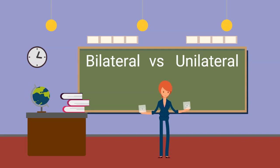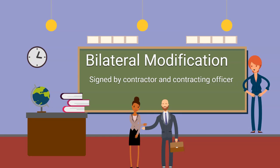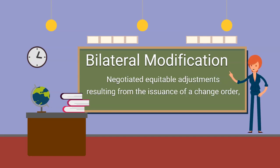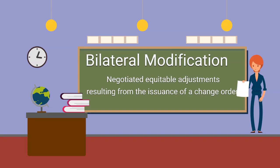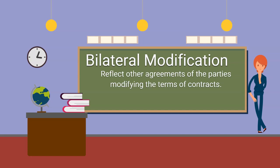We have two distinct modifications: bilateral and unilateral. Bilateral modifications are signed by the contractor and the contracting officer. They are also called supplemental agreements. Bilateral modifications are used to make negotiated equitable adjustments resulting from the issuance of a change order, definitize letter contracts, and reflect other agreements of the parties modifying the terms of the contract.